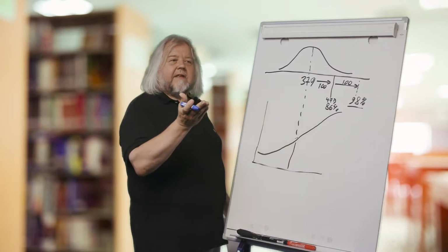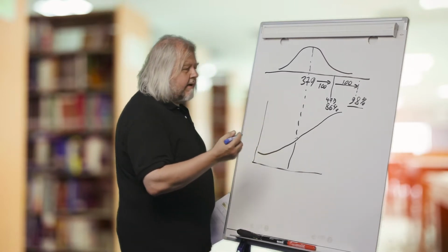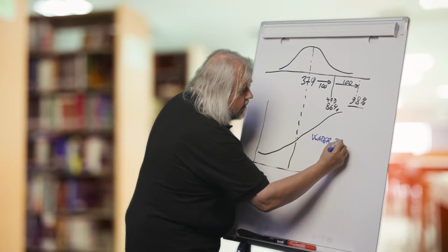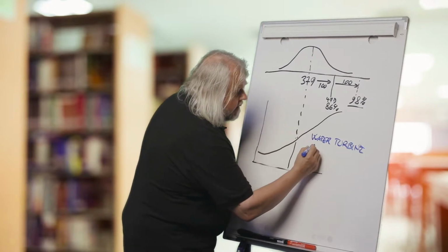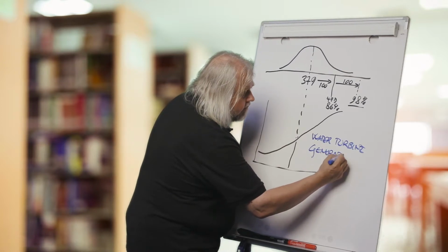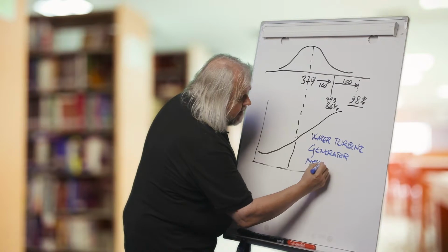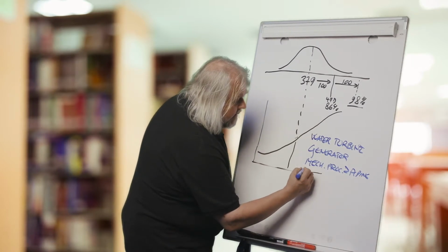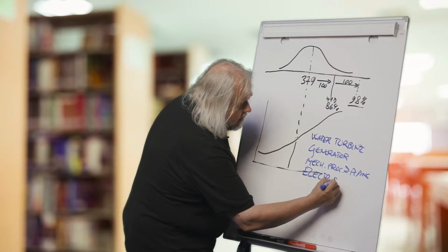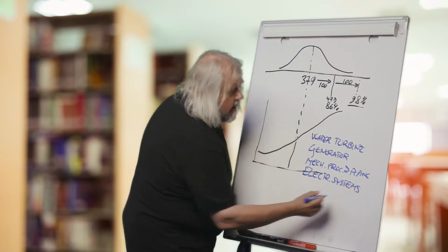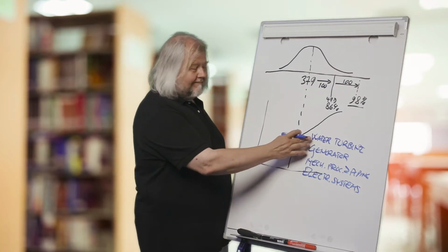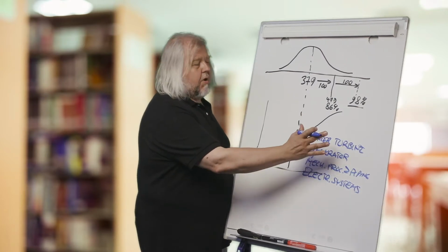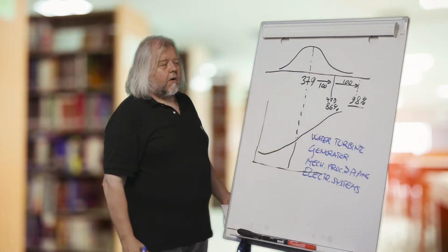So instead of having weather conditions, attitude to the customer and intangible risks, we evaluated the water turbine, the generator, mechanical processes and piping, and electrical systems. By providing for all these physical or functional parts of the project minimum, most probable, and maximum estimates with justification.